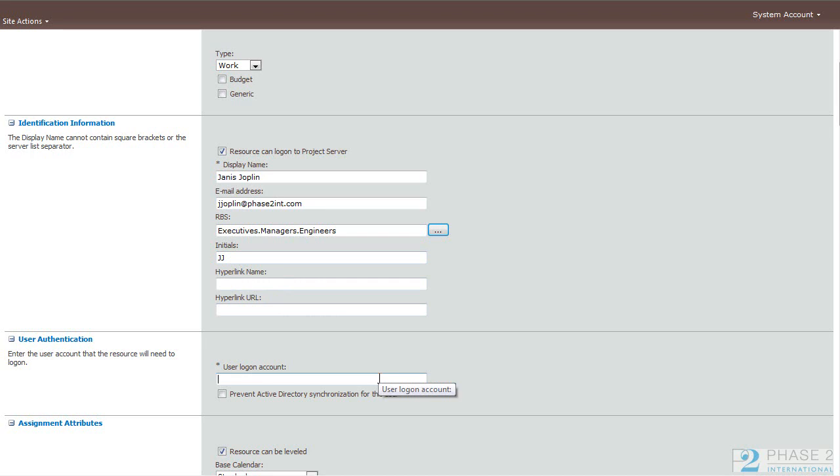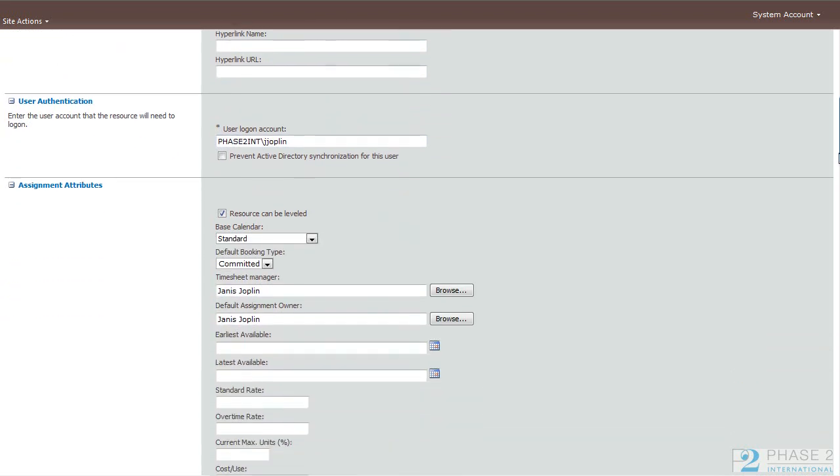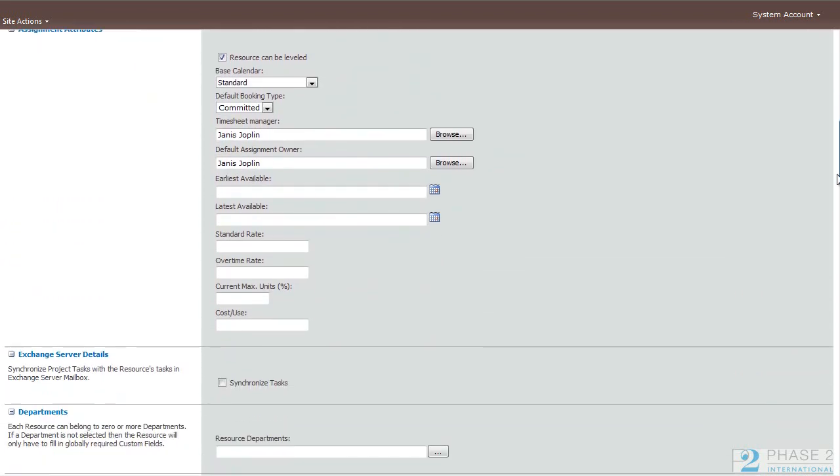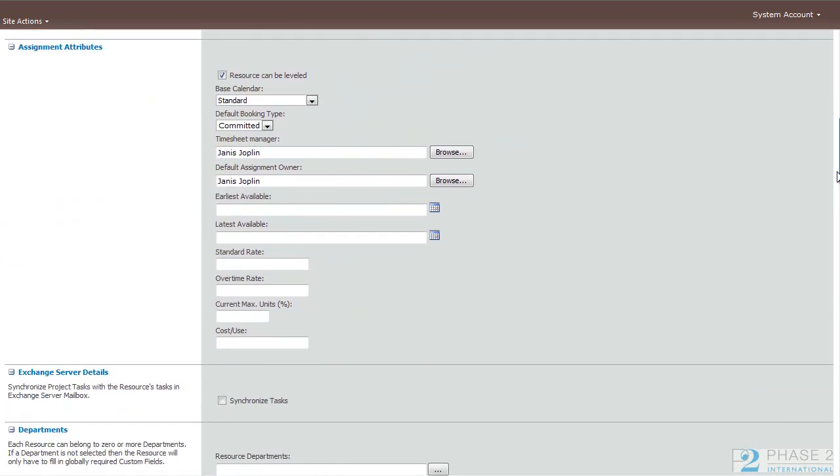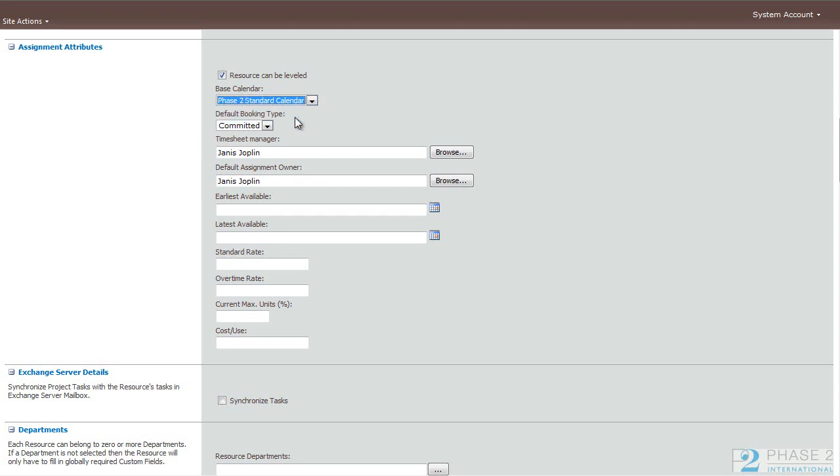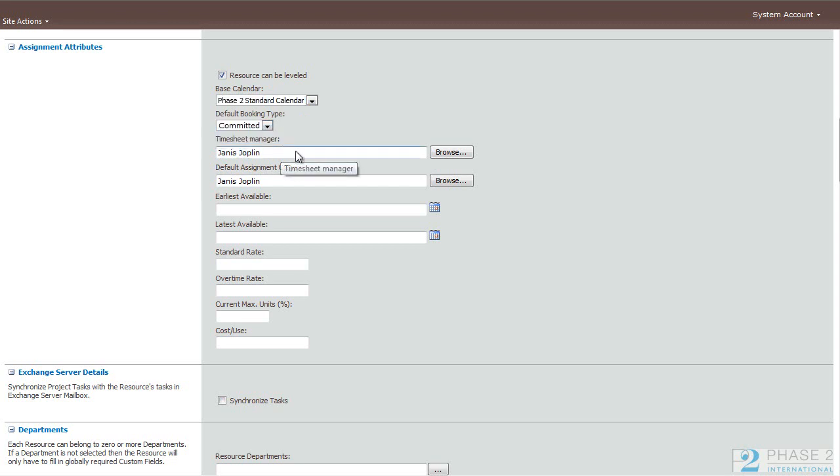If you have completed filling out the RBS table, you can give this user an RBS and initials. If the user has a website assigned to it, you can give it the website name and the link to that website. Here, you add the user's login account. So in our case, we have an Active Directory backend. Here, you can choose whether a resource can be leveled. The base calendar - we'll choose our Phase 2 calendar. Whether or not the default booking type is committed or proposed.